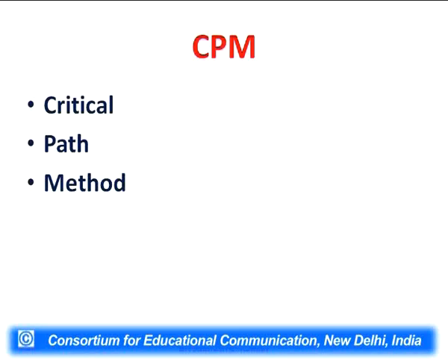While starting the project, the manager makes a list of activities and puts duration to these activities, and these durations are only estimates, and these are probabilistic in nature. They may vary while carrying out the project. That's why this is called probabilistic model. And the other network technique, which is CPM, Critical Path Method, again it is a network technique, but it is a deterministic model.